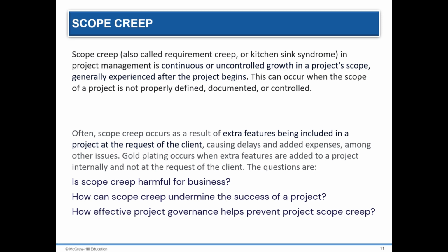Many projects suffer from scope creep, which is the tendency for the project scope to expand over time, usually by changing requirements, specifications, and priorities. Scope creep can be reduced by carefully writing your scope statement. A scope statement that is too broad is an invitation for scope creep. Scope creep can have a positive or negative effect on the project, but in most cases, scope creep means added costs and possible delay in the project.